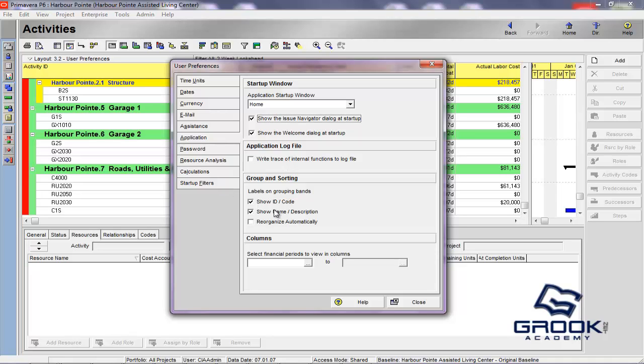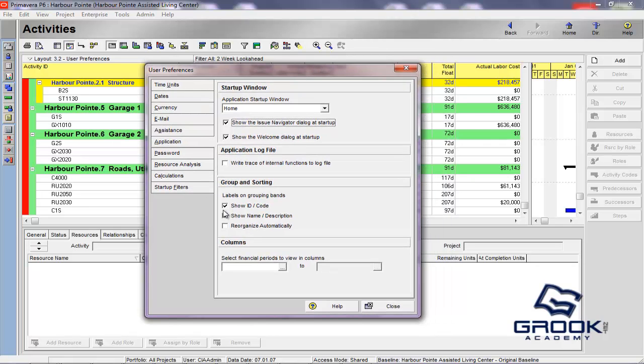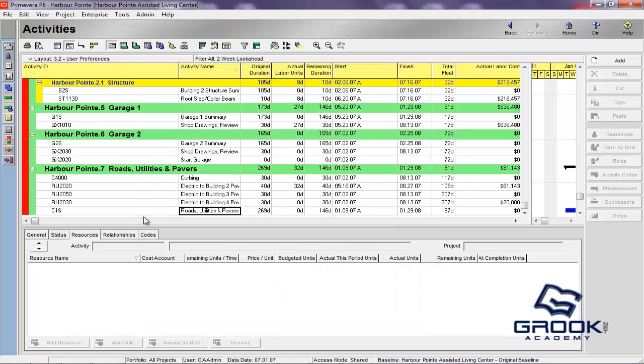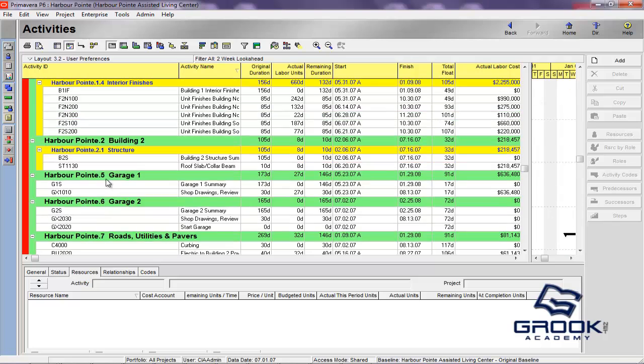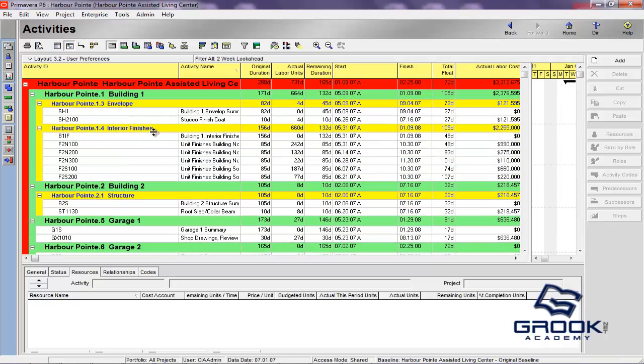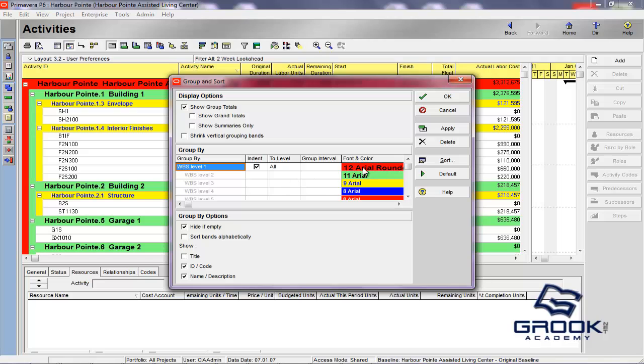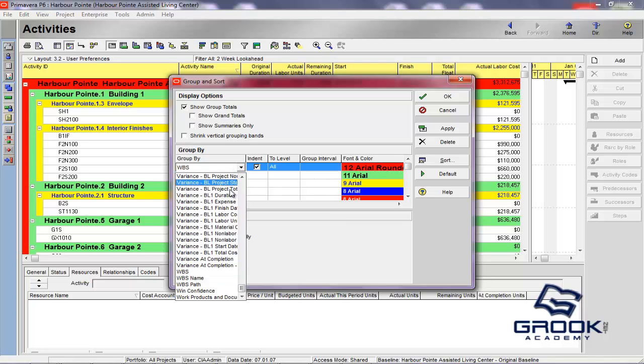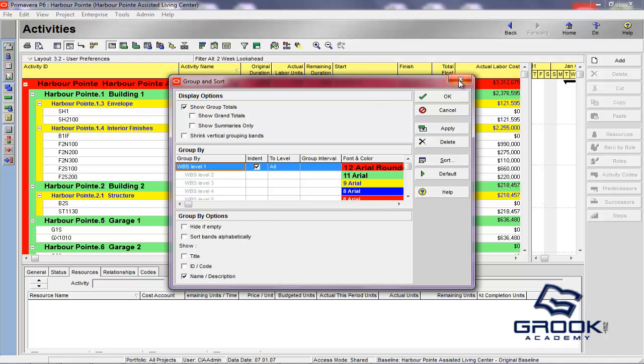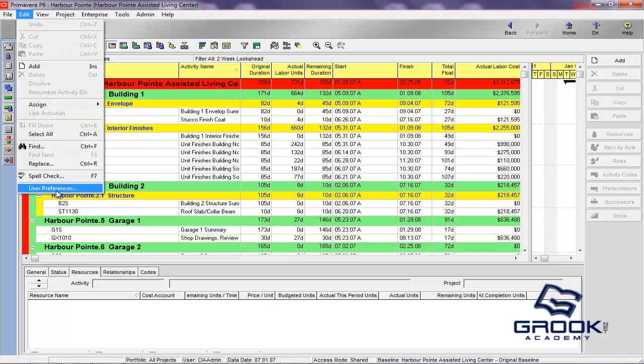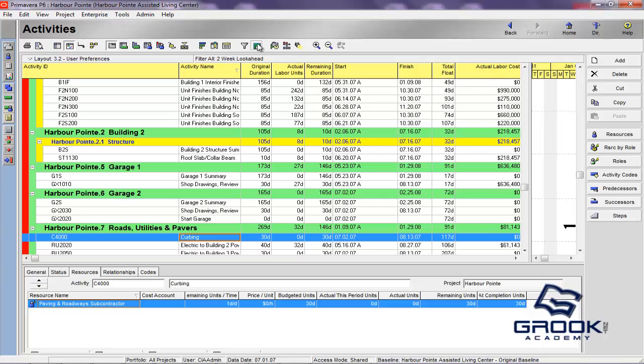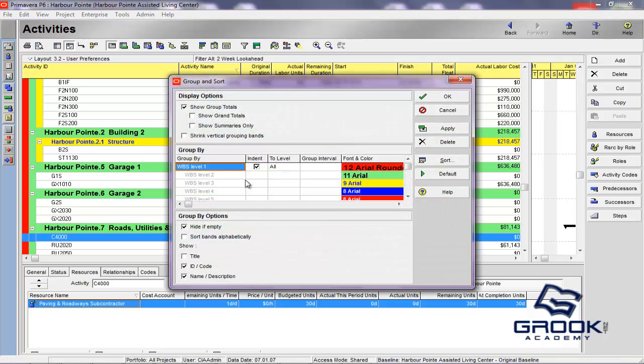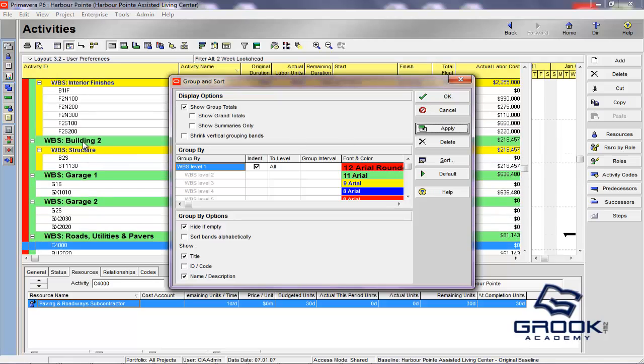So, the grouping and sorting here you'll see is whether you can show the ID code, the name/description, and whether or not you want Primavera to reorganize the bands automatically. So, what it's talking about is in your activity view here, you'll see these bands, green, yellow, red. This is your group and sort option. So, you've set red, green, yellow as your WBS levels because we chose WBS here as our group by. I very rarely would ever go into user preferences and set these. The only thing I would set is reorganize automatically. Because, normally, when you're doing a group and sort, you would do it at this level. So, you can actually set these title and ID code. You'll see that it will affect the label on the grouping band.